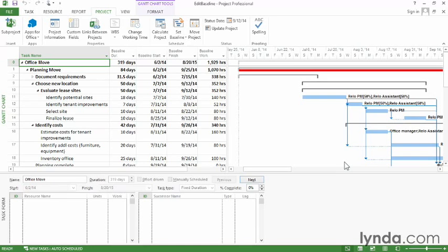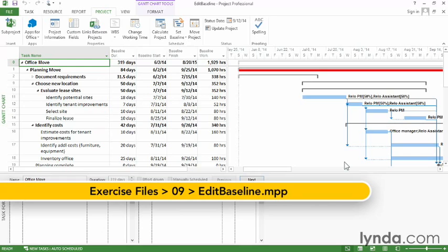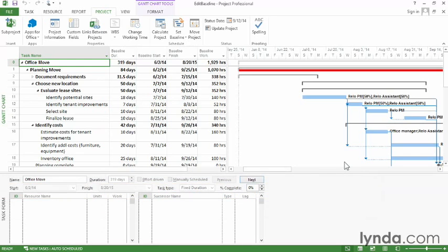Every so often, you need to edit a baseline after you save it. For example, the stakeholders might approve some additional scope, and you need to add that to the baseline. Or you might need to change baseline values that weren't correct. You can resave parts of a baseline to see the new target values while still keeping track of any existing variance from the plan. Well, before you have actual values, you can just overwrite the baseline.